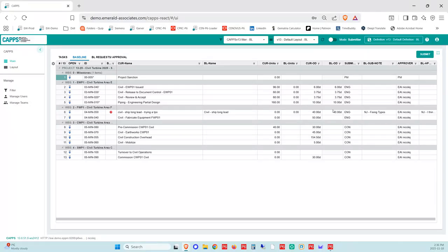So the first thing our clients wanted was the ability for a non-P6 person to give us the durations of the activity and to give us the budgeted units, usually labor, but it's not necessarily just labor, and a bit of information about the name. So those are the fields that we've exposed in CAPPS to allow input to the baseline, to the basic schedule from the beginning, okay?